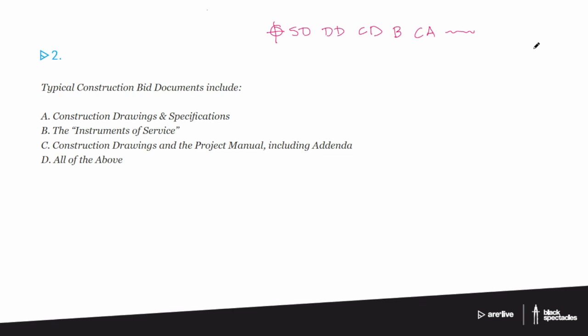If you imagine a contractor is going to say to an owner, yeah, I can build this building for five million dollars for you. Well, what building? What are they committing to? The only way that contract makes any sense is that your drawings are part of the contract. So they're saying, I'm going to build this building drawn on this date by this architect, and I'm going to label all that in the contract. And then the owner says, awesome, five million, great, let's move forward. We now know we were speaking the same language. It's apples to apples. The owner knows what the contractor's bid is going to get them. So you are creating their conversation, their contract. And so it's a legal document in all sorts of interesting other ways.